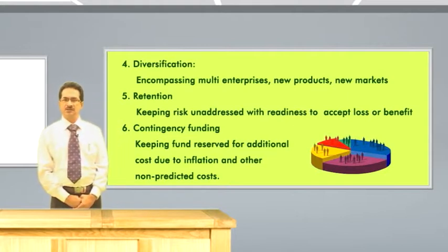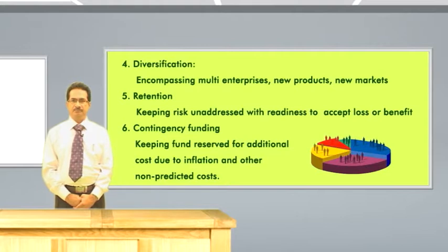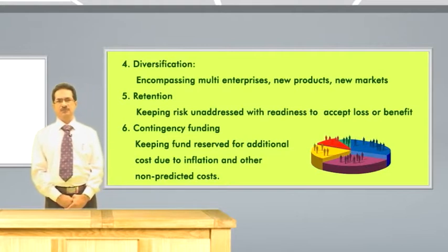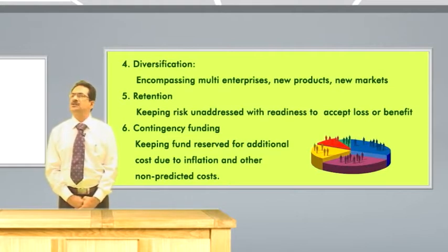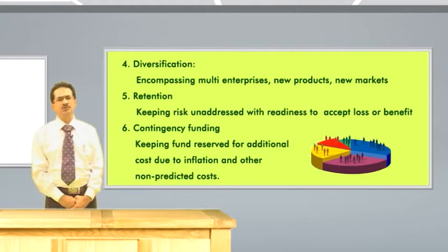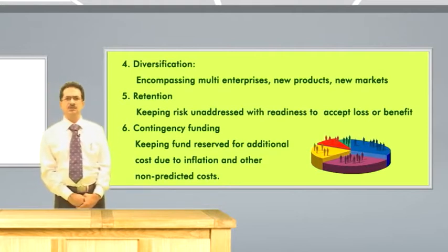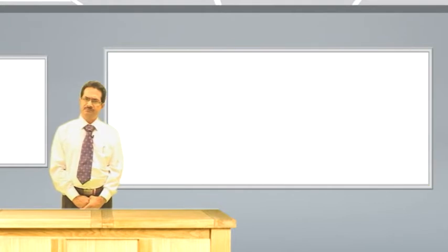Then next is contingency funding, keeping funds reserved for additional cost due to inflation or other non-predicted cost, and it is one of the most common methods practiced in corporate sectors.